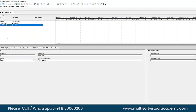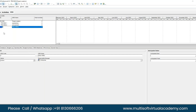Based on requirements you can build your WBS structure as detailed as you want. We're not going into too much detail here since a big project would take hours just for data entry. If you want to make a sibling — like adding Procurement at the same level as Engineering — move your cursor to the arrows on the extreme right side of the Primavera screen and hit the arrow to promote it. Then name it 'Procurement'. Add one more, promote it to sibling using the arrow, and name it 'Construction'. The numbering is handled automatically.